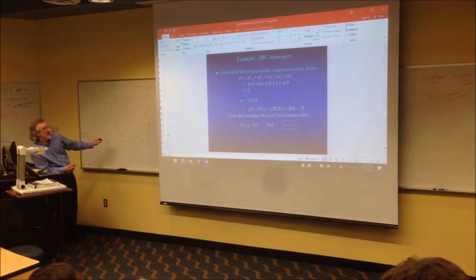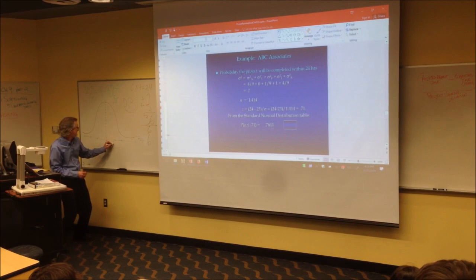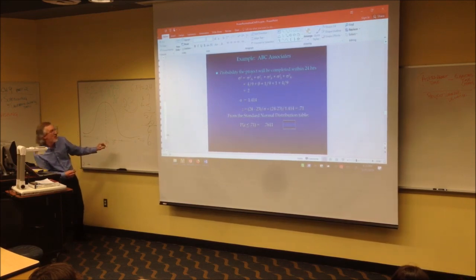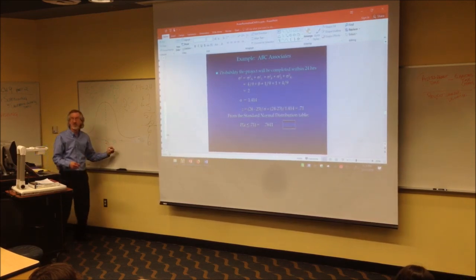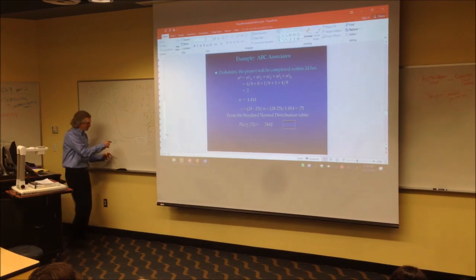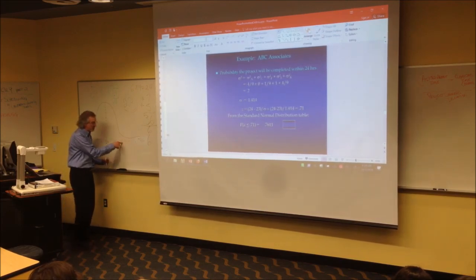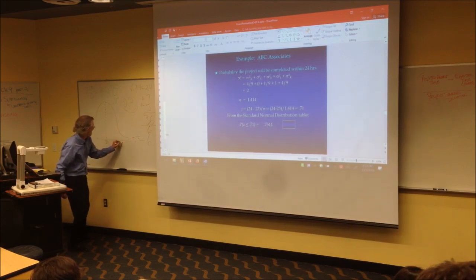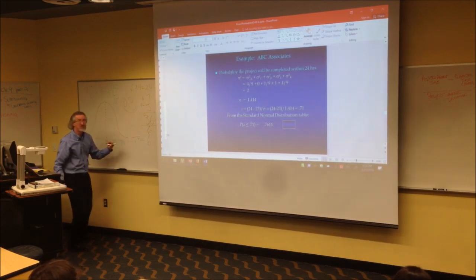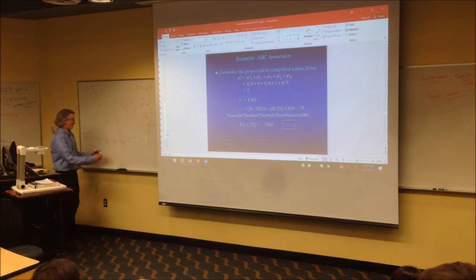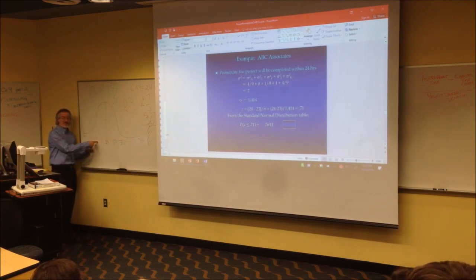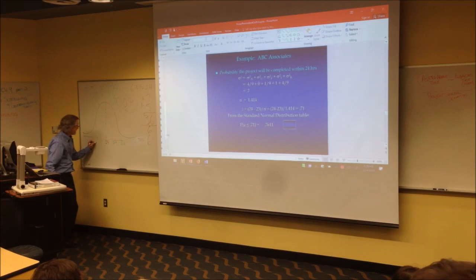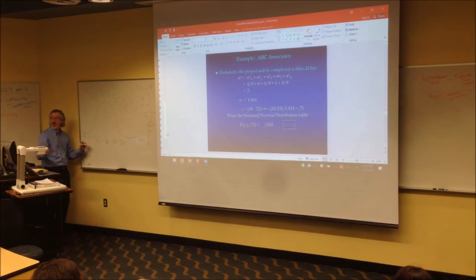23 plus 1 standard deviation, what does that make this? 24.414, we'll just call it 24.4. Now, I need a calculator here. 24.4 plus another 1.41, oh, that's easy. That's going to be 25.8, does that sound right? We're good? Now, let's subtract 1.4. So we're at 21.6. Help me out.